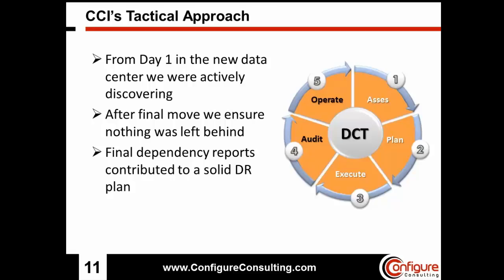Step 4 is auditing the data that we've got coming back. From day one, we set up a new discovery probe within the target data center, and we're actively discovering for any servers that came online. So even with the first and early move event, we saw those servers come online, and we're able to do a comparison of the configuration of that server in the new data center compared to how it was built in the previous data center.